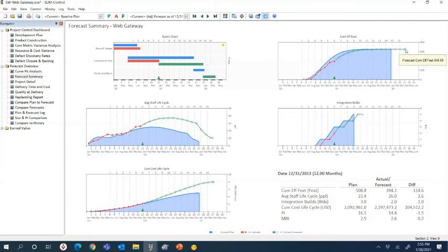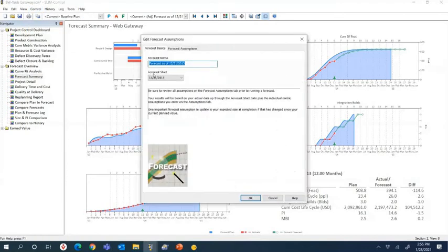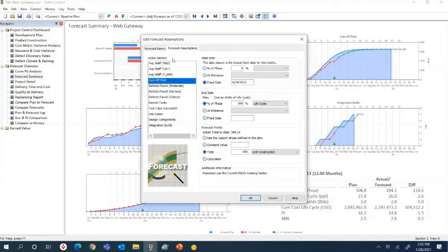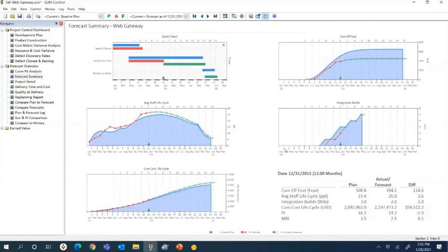Now, another trade-off, another option might be, well, what if we reduce functionality? Can the customer live without those features till the next release if we tie it up early? And we can look at those trade-offs as well, see the impact of that. So if I hit OK, it's going to run another estimate based on a smaller amount of work. And you can see here that, okay, we're getting pretty close to getting done on time. People look good, staffing, cost, and you can see here where we've tied it up early.